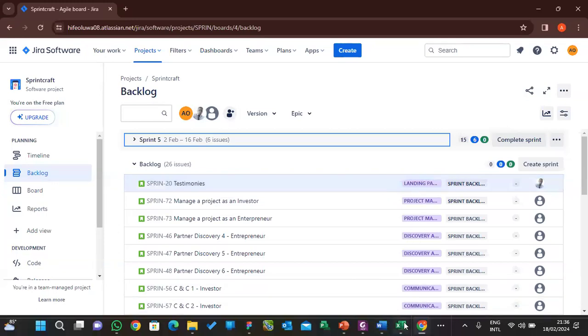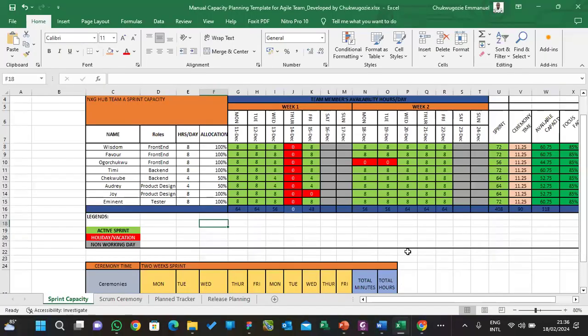To understand the availability of your team, you can do it by understanding who your team members are for that sprint, how many people are going to be available throughout the sprint duration, and how it is going to affect your sprint. Because let's assume some people may have their off, maybe there's vacation or there are public holidays coming in that week they're going to plan that sprint, right? Scrum Master, you need to know all this ahead of time, right? So that is where capacity planning comes in. Capacity planning helps you to determine the availability of your team, right?